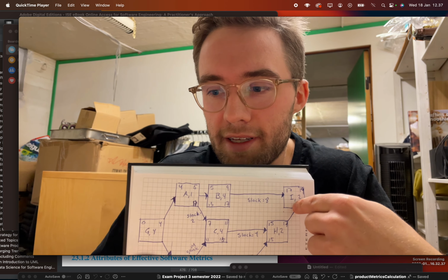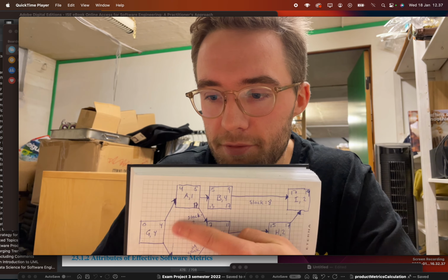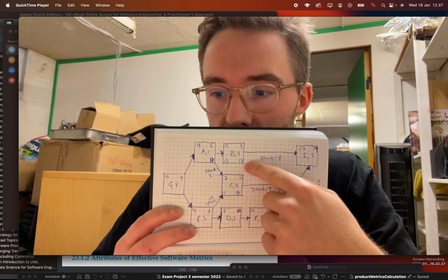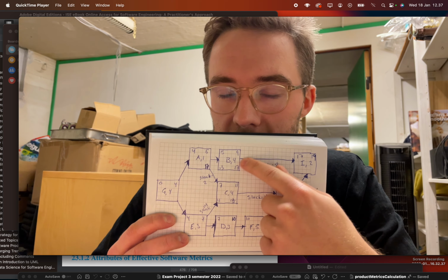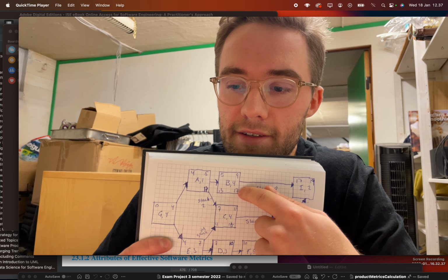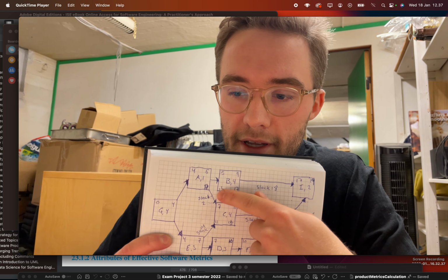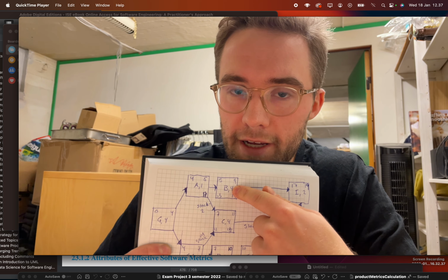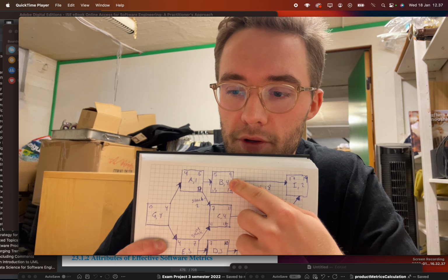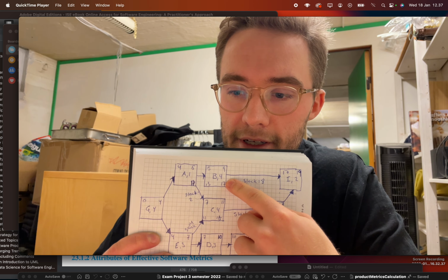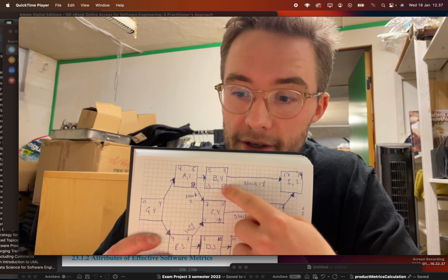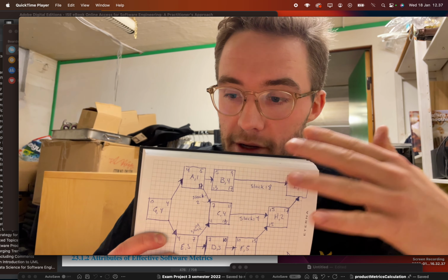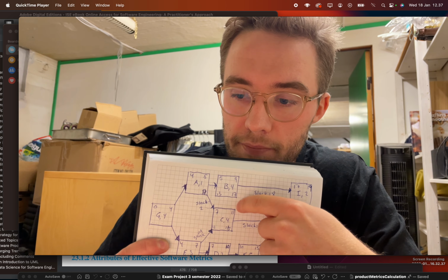So that says that when we have finished these paths, we can then say that this is the latest it can be done, and this is the latest it can be started, because it has to count for 4 hours. So you could postpone this task.